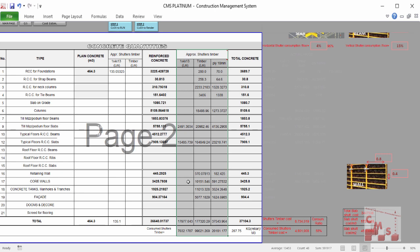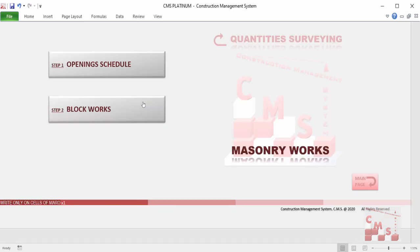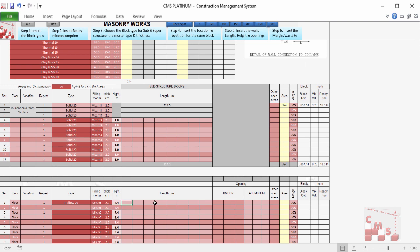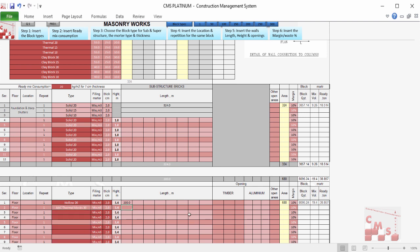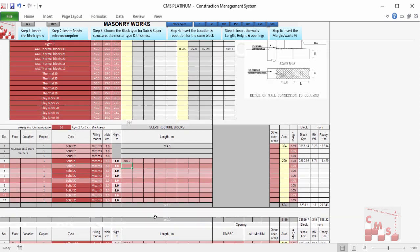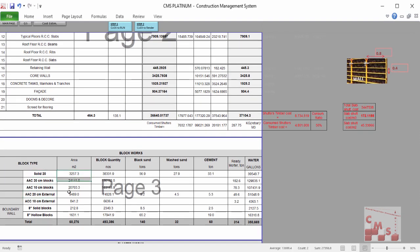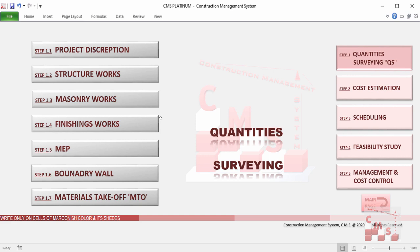Furthermore, CMS will give us the approximate shutter required for all concrete elements, plus the margin of these shutters, which will be used automatically by CMS to calculate the cost for each concrete element. The same can be done for masonry work — just choose the type and insert the height and length of the block, choose the mortar type, and CMS gives for each type of block: the required area, number of blocks, and mortar quantity. This is also reflected in the material takeoff, showing area, quantity, and required mortar — whether ready mortar or site-mixed with sand and cement — all automatically.